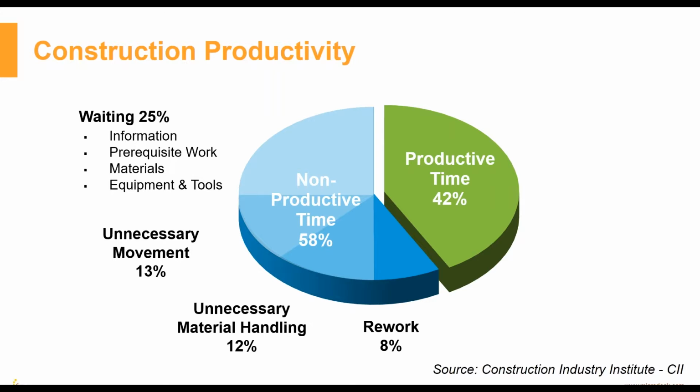Some of the time we're waiting, whether that's waiting for new information, whether it's an RFI or a change order. We're waiting for somebody else to finish what they were doing so that I can come in afterward. Whether it's I need somebody to finish putting in the electric or the piping before I can close up the wall, or other requisite work from the design trade even. Materials to show up, different equipment or tools or expertise to be available on a project. Say there's one delay that pushes people off onto a different project. Now we have to wait for them to be available to come back.